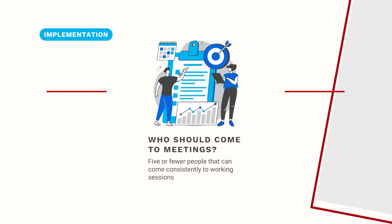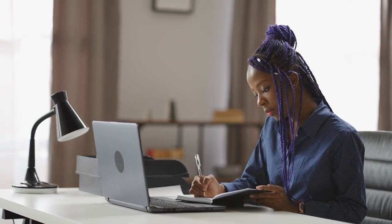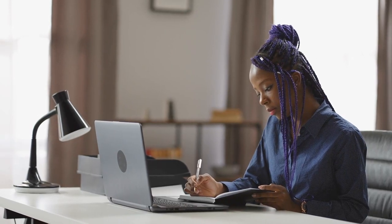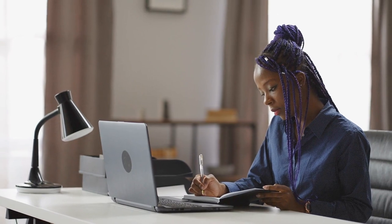We recommend that you bring the same team members to each working session for consistency, and we also recommend bringing five team members or fewer. With too many people all learning at different speeds, divergent questions may slow down the flow and limit the effectiveness of the calls. At the end of each working session, you will have a to-do list and your implementer will also have a to-do list.